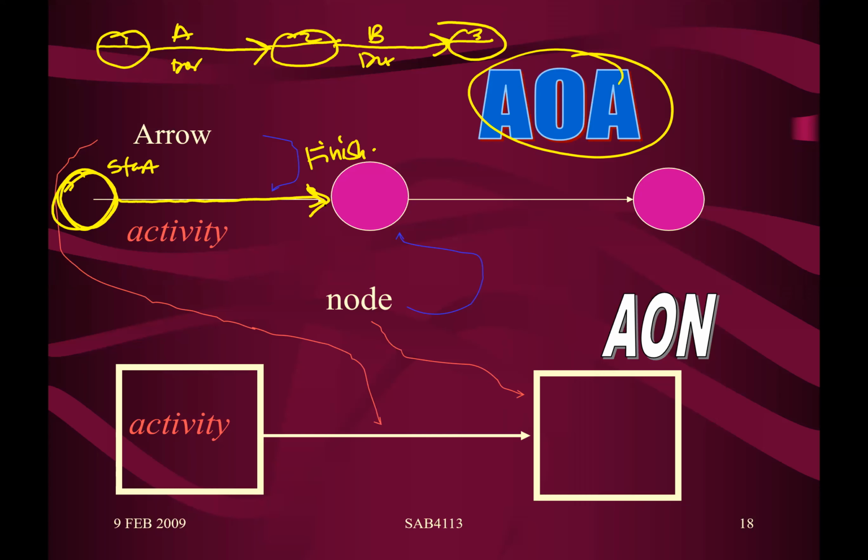So this is what we call an arrow. It indicates an activity. Let's say the activity is piling. The name of the activity is written on the arrow. The next could be stump. See, after piling finishes, then stump will start. Let's say it goes on for 3 days, whereas piling could go for 10 days and then it will finish.